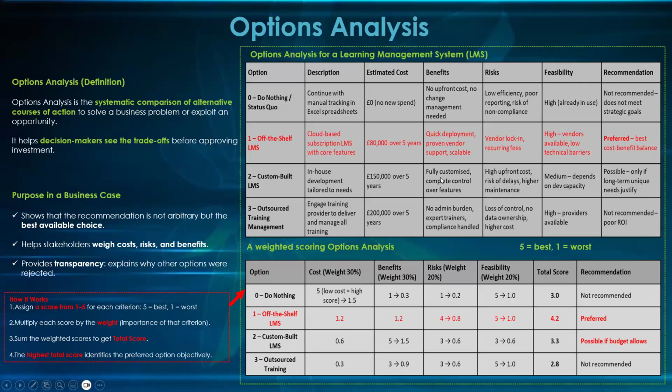What's the benefits? We can customize it the way we want because we have control over it, because it's our own. It's not like the one that we are buying that we don't have control. So what's the risk here? The risk is upfront cost. The money to start up is high. We have to pay Scrum Master, business analysts, developers, the QAs, to get it done. So it's a huge cost for us.